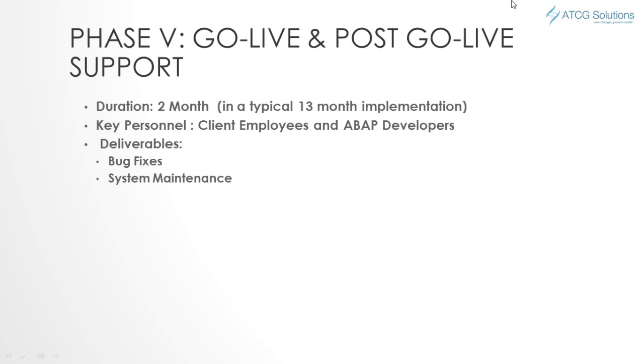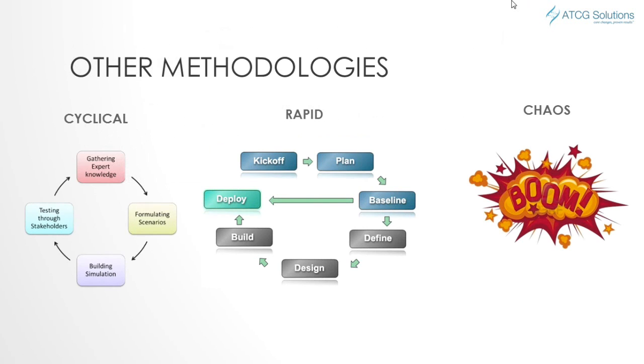There's also system maintenance. At this time, you could actually update your system or do any kind of maintenance on your system, but please do not do any system updates or changes during the project. This could cause a lot of issues with transports and system alignment.